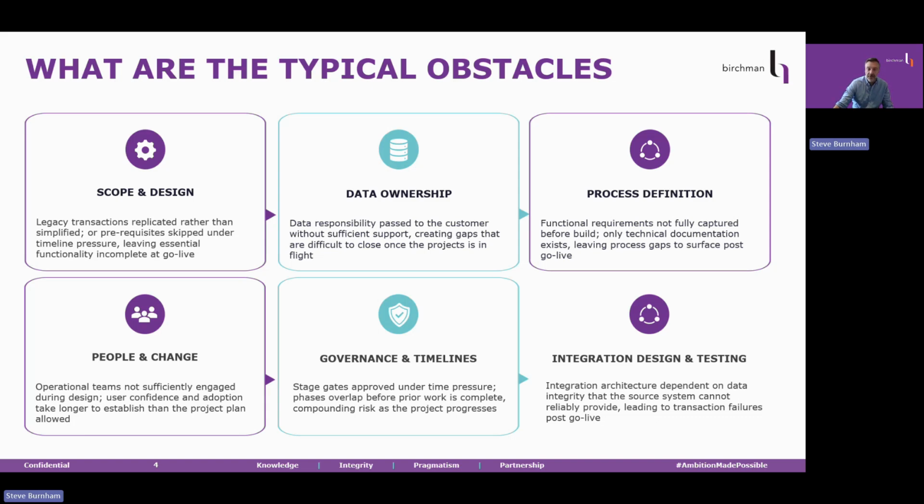And so at go live, when the integration runs against live data for the first time at scale, referential integrity failures cascade. This is not a technical failure in isolation. It's a governance failure that became a technical failure. The integration errors are the symptom. The root causes are always upstream.